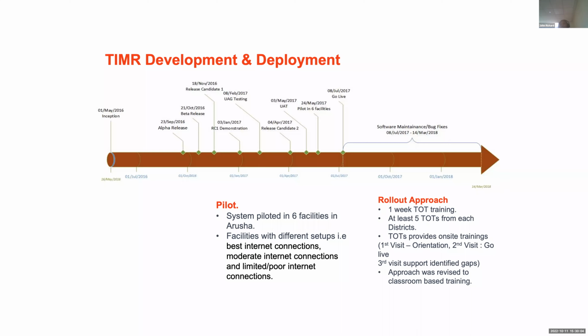And then when a solution was ready, we did piloting. For the piloting, we selected a few facilities, and we also considered different factors like facilities with higher volume, with higher number of children, facilities with good internet connection, facilities with low internet connection, to ensure that we can test a solution in the different environments.